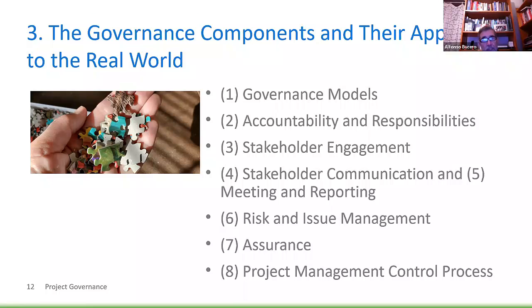This is my recommendation: ask questions to all the stakeholders and verify that you are on the right path to satisfy their expectations. The stakeholder needs to be defined in order to ensure that each stakeholder understands the mode and content of communication, the frequency, who is the owner, which are the milestones, which are the gates, and this type of thing.